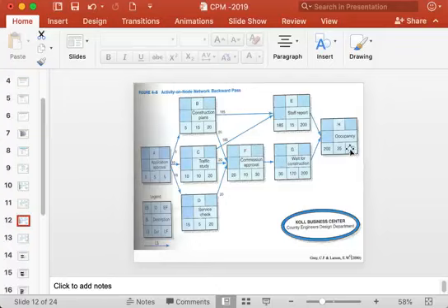After having decided that the latest finish time is 235 days, in order not to allow the project to delay, activity H can finish at the latest after 235 days if we allow activity H to start at the latest after 200 days, which we get by subtracting 235 days minus 35 is 200.